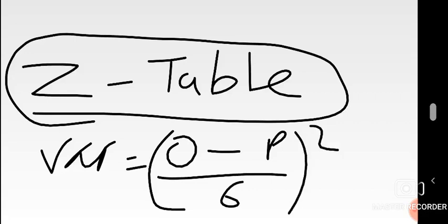So you also have to get the variance values for each route. From 1 to 2 you get the variance, from 1 to 3 you get the variance, and then you have two columns, one for mean, one for variance. Then get their totals. Basically that's what we do.